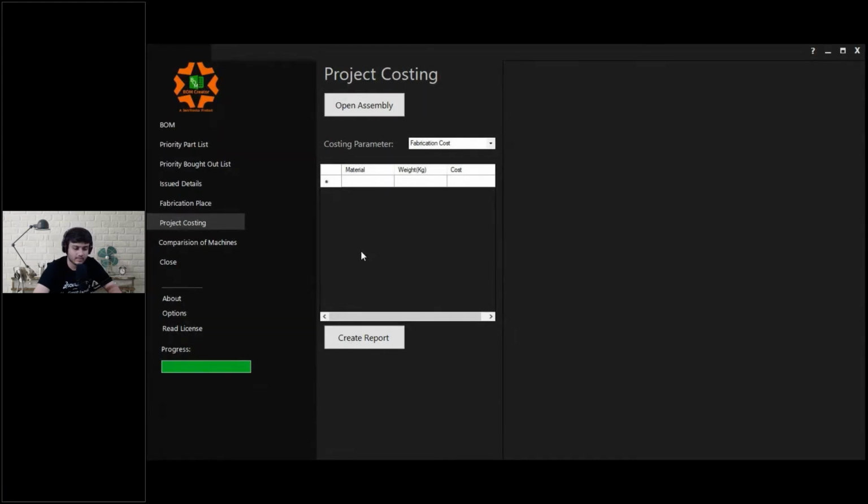The stage 1 is, as I said, when I receive an inquiry. So now from the market, someone asks me, what's the price of your machine, right? So at that stage, I need to answer them with a quotation. And the second stage is when I've executed my project and I want to know if I have met my profits or not, right? So there are 2 stages when I'm supposed to do my costing.